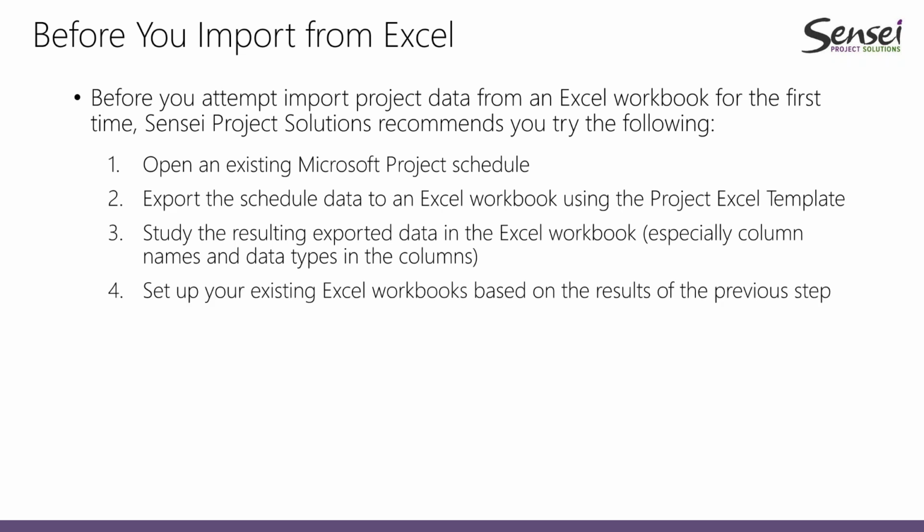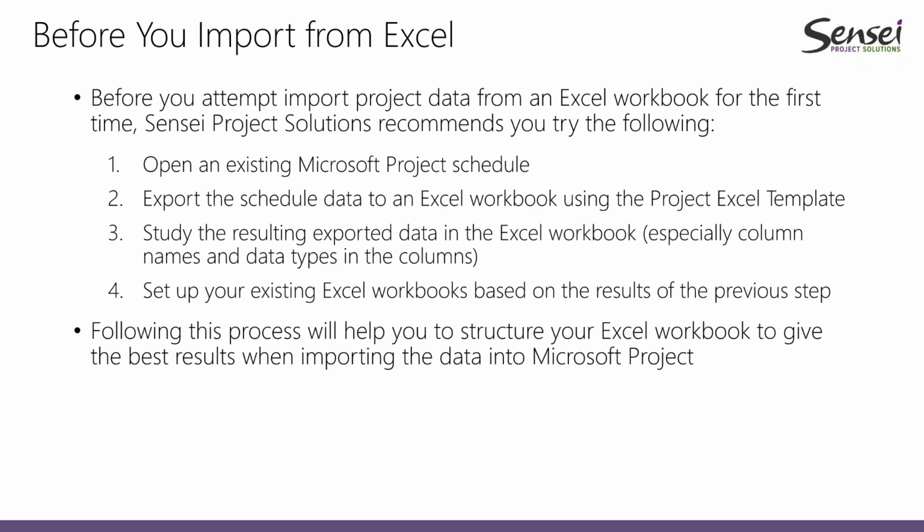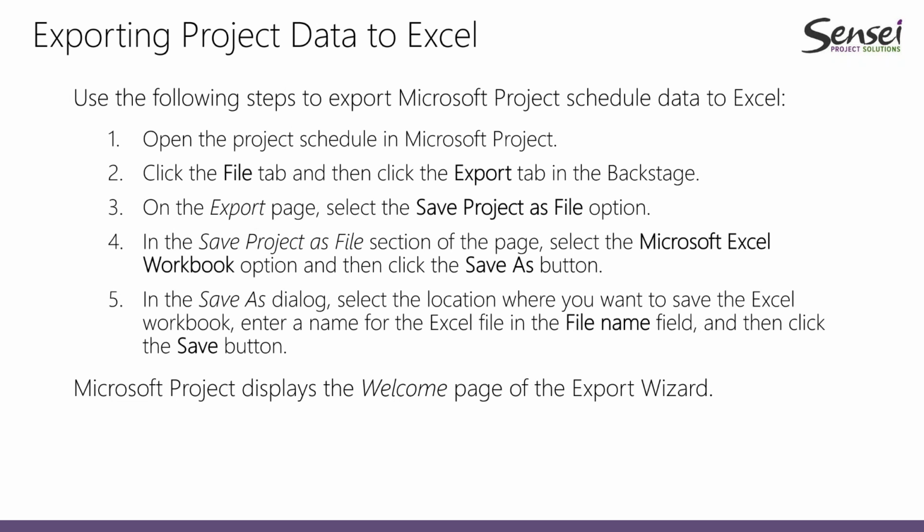Then, based on what you have learned from your study in step 3, you need to set up your existing Excel workbooks so that they match what Microsoft Project is expecting. We believe that if you follow this process, it will help you to structure your Excel workbook to give you the best results when importing the data from Excel into Microsoft Project.